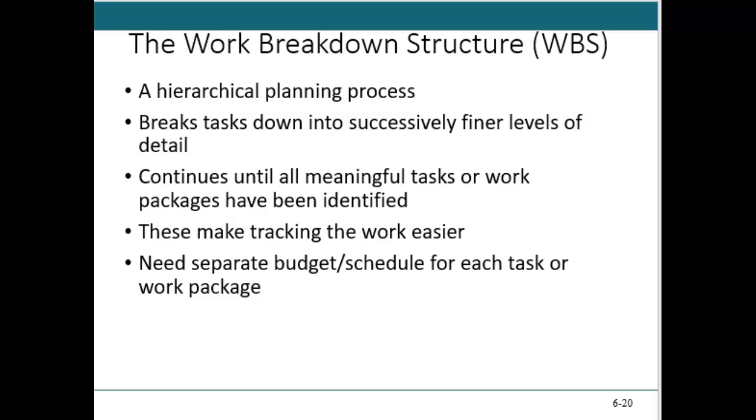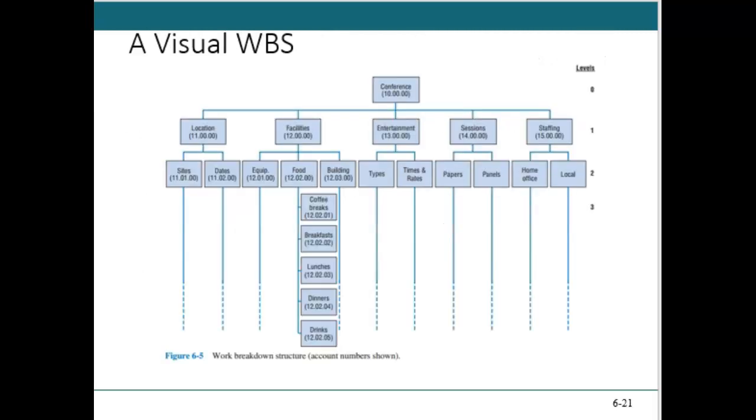And so it breaks down, as I said, into the finer levels, and later is going to help us develop down into activities. Activities become the schedule, and in the schedule, I'm able to then aggregate back up, aggregate meaning adding up from the bottom, aggregate back up through the work breakdown structure to add up all my costs to make sure I've got a good cost structure.